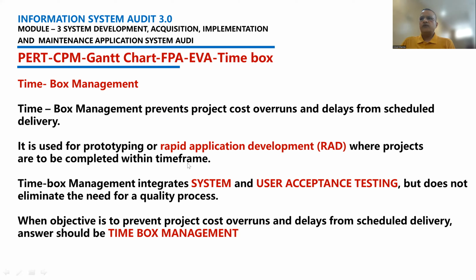But here I'm giving an example that time box management is used when you are prototyping or going for a RAD, because in rapid application development of software, you don't bother about documentation, you don't go about the formal structure. You simply develop a small prototype, implement it, find out what the shortcomings are, then again improve the prototype, implement it. When you are doing this type of work, time box management is very helpful in preventing the cost overruns as well as delays.